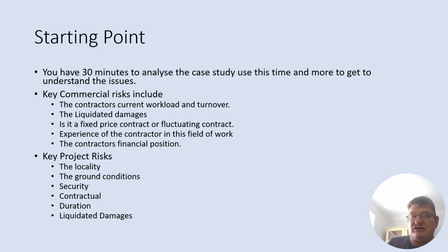But you priced or you submitted your bid maybe even a year previously. So there's a risk that the prices for labor, plant and materials will increase. So you've sort of got to make an adjustment maybe based on that. If you've got a clause in the contract which allows for fluctuations, you can calculate it as we did a couple of weeks ago, and you can add it in maybe 5%, 7% for fluctuations because of inflation. It's a long contract, 12 months to 15 months. Some of the projects that we did about 4 or 5 weeks ago, maybe 6 weeks ago, you've got a clause in there that covers those fluctuations, but not every contract will have a fluctuation clause, okay?